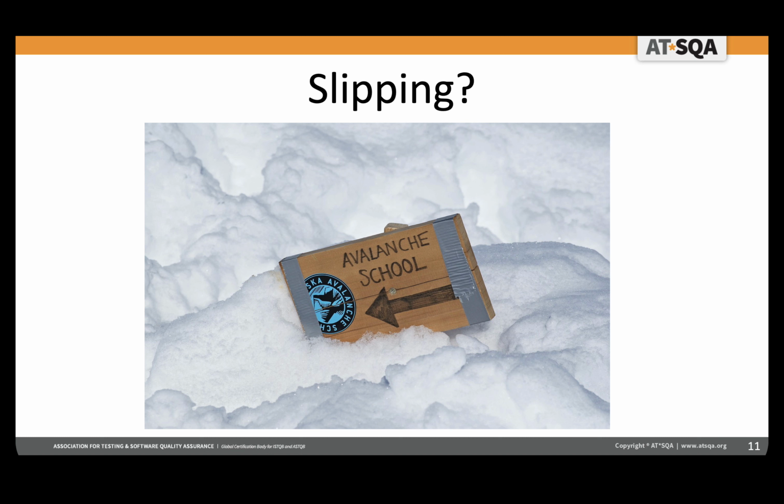And it turned out a lot of the stories were only partially done. They hadn't really been completed. They had this truly avalanche of slippage. And what they ended up doing was they just began adding new sprints. So we came in at 9. It was supposed to be done at 10. So 11 got added, 12 got added, 13 got added. Last I heard, it was on about 21. And that was just basically doing stuff that they should have done to start with.